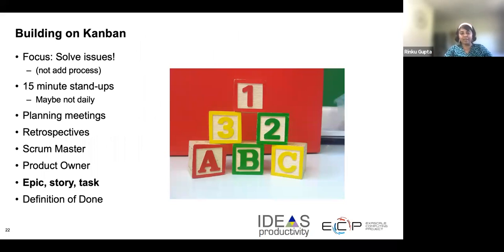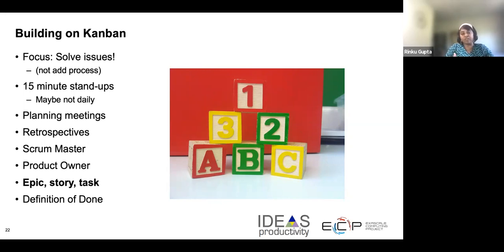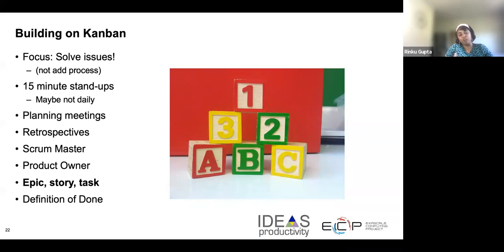Now that we have discussed basic Kanban, let's talk about how we can build on it. The focus should always be on resolving issues. One way to build upon existing Kanban is to have regular 15-minute stand-up meetings where people report their progress on different columns of the Kanban board. You can also have planning meetings and retrospective meetings. Retrospective meetings are a great way of figuring out what you've done on the project, what things have gone well, what things have not gone well, and so on.